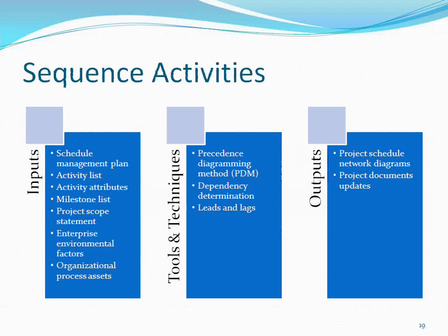In a project, I told there will be many activities which you will be doing, and there will be some relationship. For example, after finishing foundation, then only you can raise the superstructure. Without finishing, you can't do it. But after finishing plastering, parallelly you can do painting. You need not wait for the entire plastering to be finished. One room, if you finish the plastering, you can do the painting. In the other room, they will be doing the plastering. So there are certain times where you have to finish a predecessor activity in order to start the successor activity. Sometimes you need not wait. So you will build these relationships here.